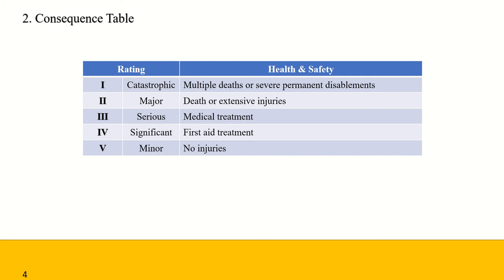The assessment process includes: determining the consequence of each risk, assessing the likelihood of those consequences occurring, converting the consequence and likelihood rating to an initial priority for the risk, and developing agreed risk priorities. Consequences are rated in terms of the potential impact on the criteria, often on 5-point descriptive scales linked to the criteria identified in the context.